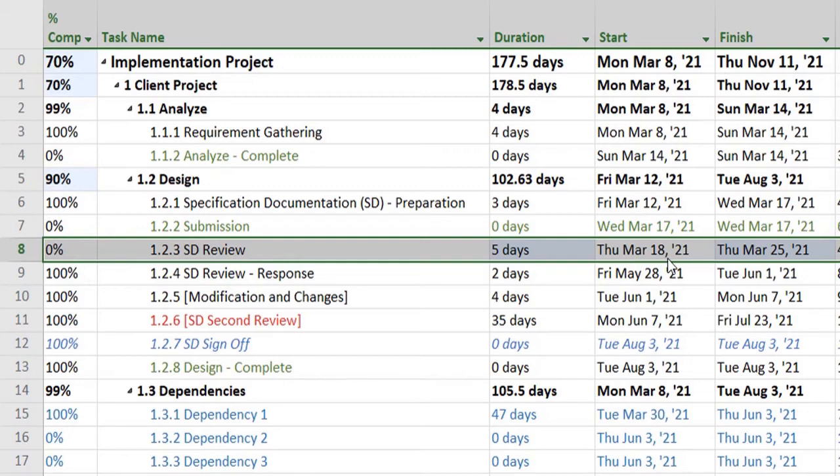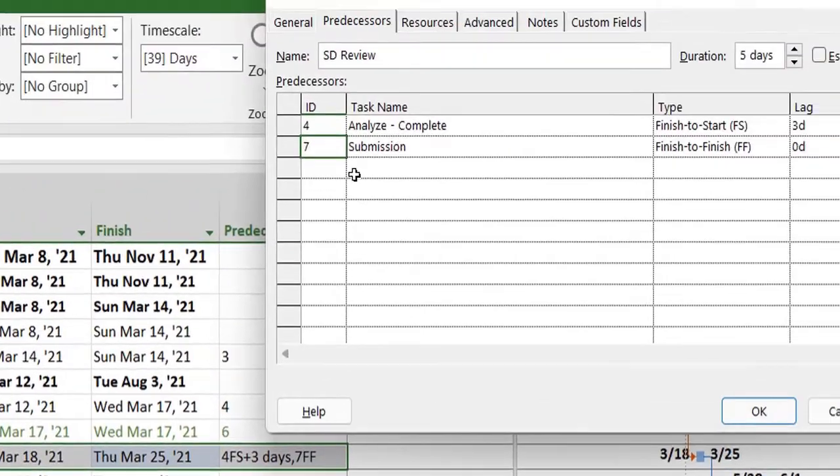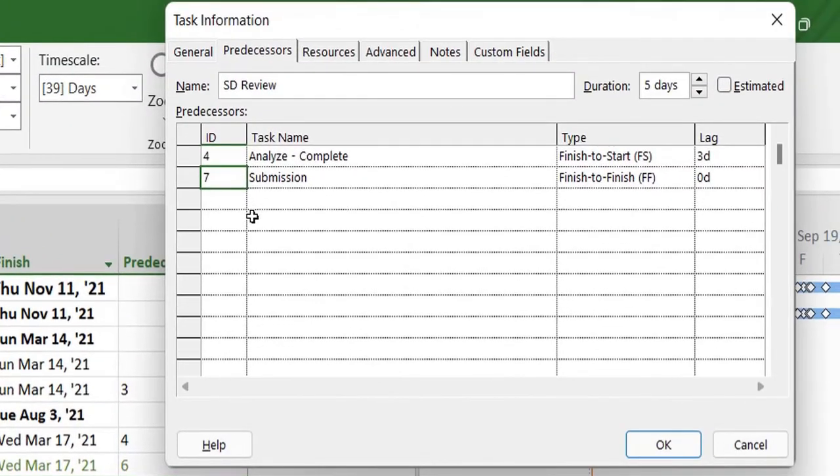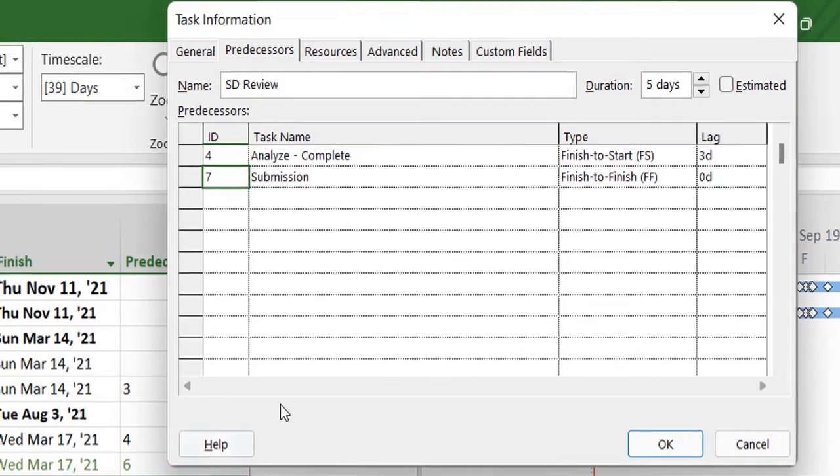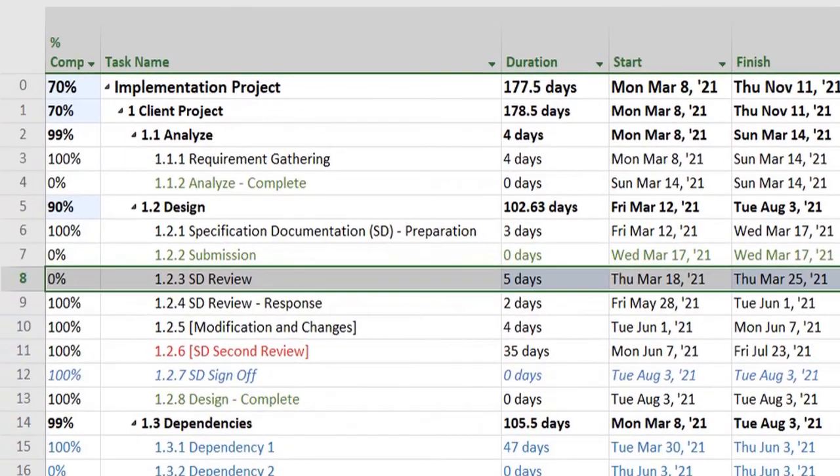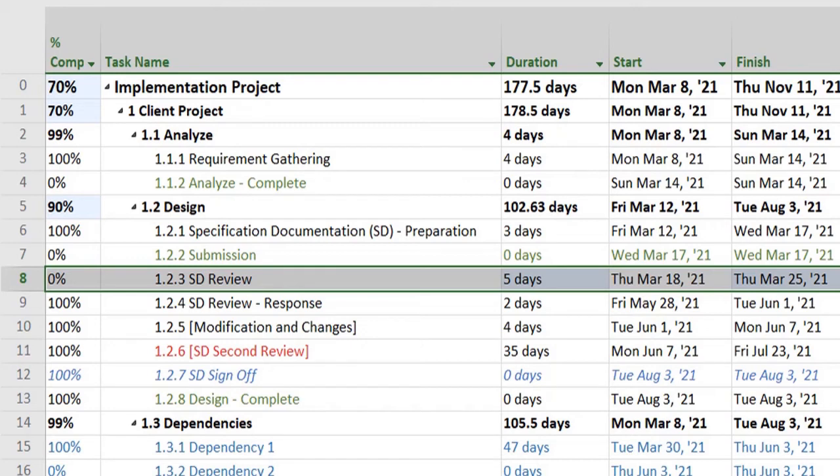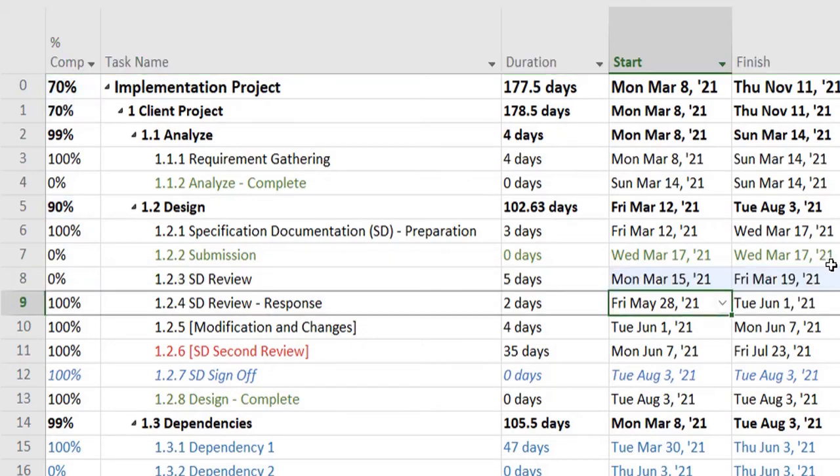There is also a dependency or relationship with task number 7, that task number 7 and task number 8 should finish equally or would finish side by side. However, since task number 4 is pushing it forward, it will change the dates. So you can see that it's aligning it accordingly.